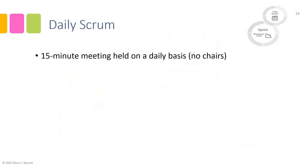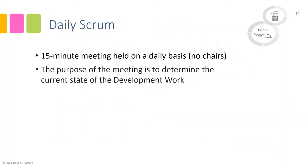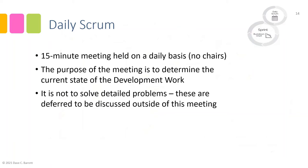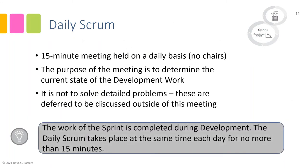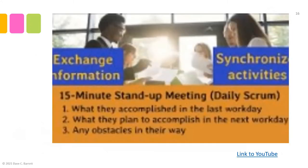A key aspect of development work is the daily scrum — a 15-minute meeting held every day. There are no chairs; it is often called a daily stand-up meeting. The purpose is to determine the current state of the development work. It is not the place to solve detailed problems — those are deferred to be discussed outside the meeting. The work of the sprint is completed during development, and the daily scrum takes place at the same time each day for no more than 15 minutes.